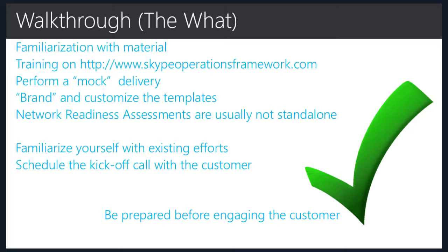The network readiness assessments are usually not standalone, so make sure you talk to the deployment team and make sure that when you're talking about doing a network readiness assessment, the rest of your deployment team knows this, that they know you're doing it, and they might have already done things like a persona workshop, so you might be able to recycle their materials. So familiarize yourself with existing efforts, and when you're ready, schedule the kickoff call with the customer. You should be prepared before engaging the customer.